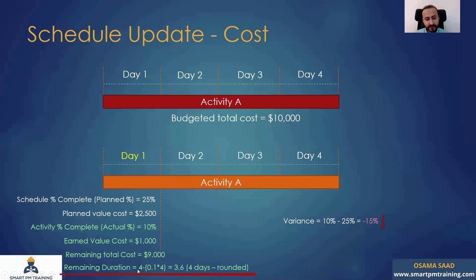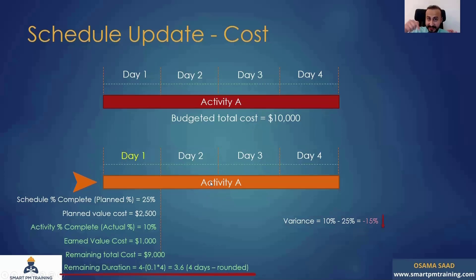The remaining duration is 4 minus 0.1 times 4 — which is 10% times the original duration of 4 days. So the remaining duration is 3.6 days. In Primavera, if you have 10% for this activity, you'll end up with 3.6 remaining duration. But Primavera does not show decimals — it will round to the nearest integer, so we get 4 days.